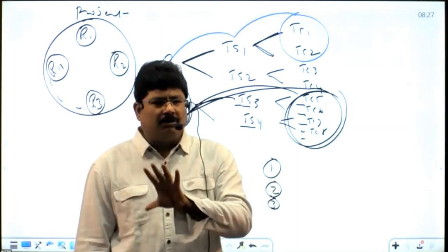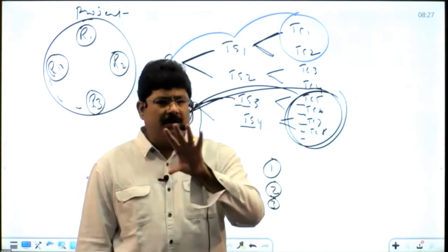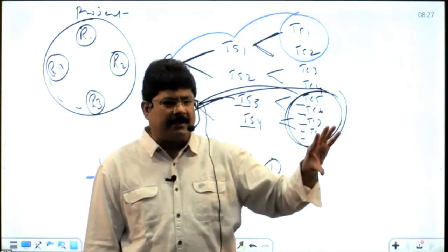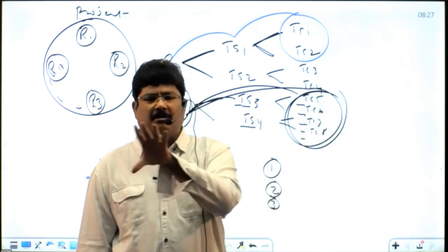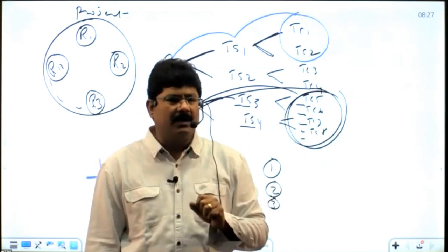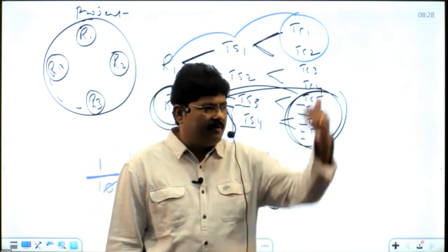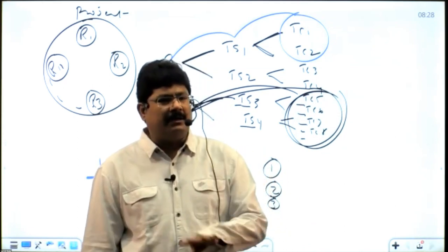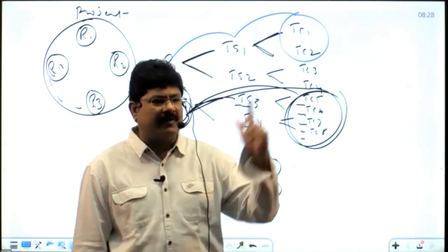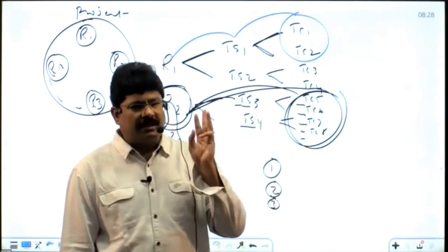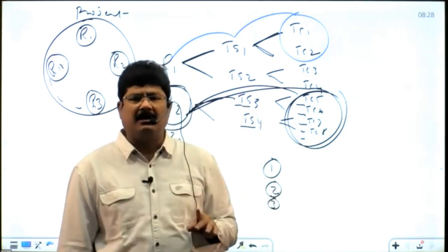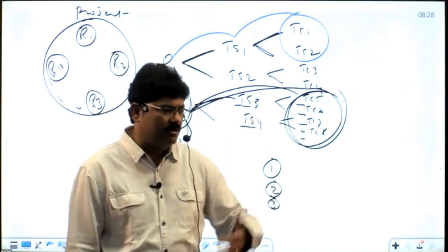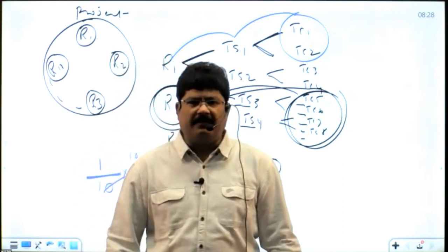As we are able to trace a group of test cases and scenarios belonging to a particular requirement, when the customer asks for any changes in that requirement, we know these are the scenarios and test cases to be updated. If I don't have RTM, whenever we receive a change request, tracking and updating the remaining work artifacts becomes very difficult. These are the 3 major advantages you get by maintaining an RTM document for a project. Make a note of it. Advantages of RTM.